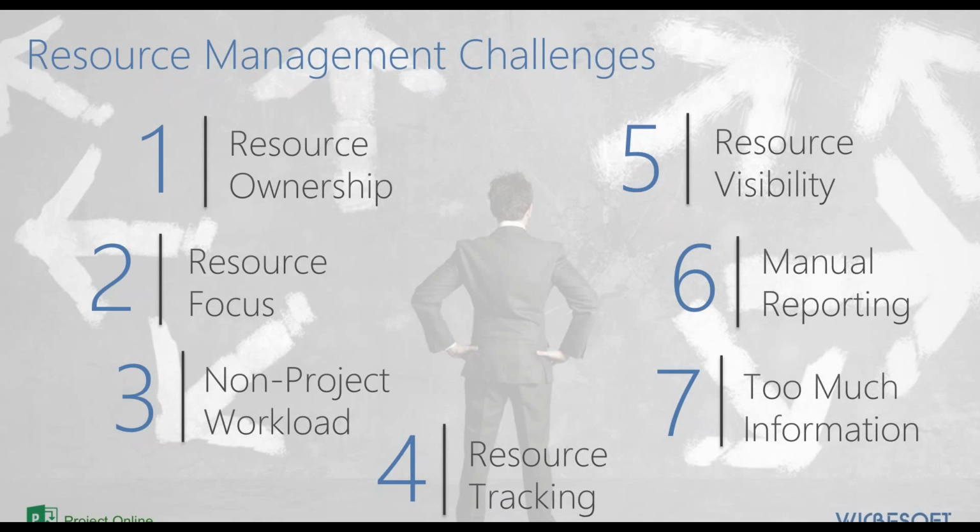When we think about project and portfolio management, oftentimes organizations allocate resources as if these resources are fully dedicated to these projects and don't have other operational or administrative workload to do within an organization. And by not factoring those things in, we can often tee ourselves up for failure by not properly factoring in what the available bandwidth is of our resources.